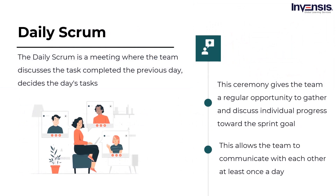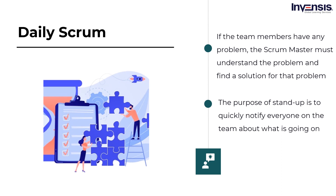The next Scrum ceremony is the Daily Scrum. The Daily Scrum is a meeting where the team discusses the tasks completed the previous day, decides the day's tasks, and discusses any problems the team members face. This ceremony gives the team a regular opportunity to gather and discuss individual progress toward the sprint goal, allowing the team to communicate with each other at least once a day. The purpose of the stand-up is to quickly notify everyone on the team about what is going on — it is not a comprehensive status meeting. Ask each team member: What did I do the day before? What am I going to work on today? And is there anything impeding my progress?